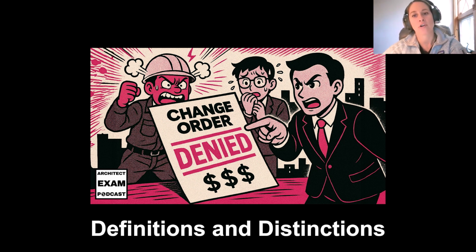When a contractor and an owner can't resolve a change order disagreement, and the contractor needs to take steps on what to do next, the contractor will formally seek additional compensation and start the documentation process, and that is called a claim. So for a claim to be valid, you generally need to demonstrate a couple of things, such as entitlement, causation, and the amount, or what we call the quantum, essentially the amount of damages or compensation that's being sought. So essentially, if the contractor feels they are due a certain amount, they're going to document that, and that will be the claim.